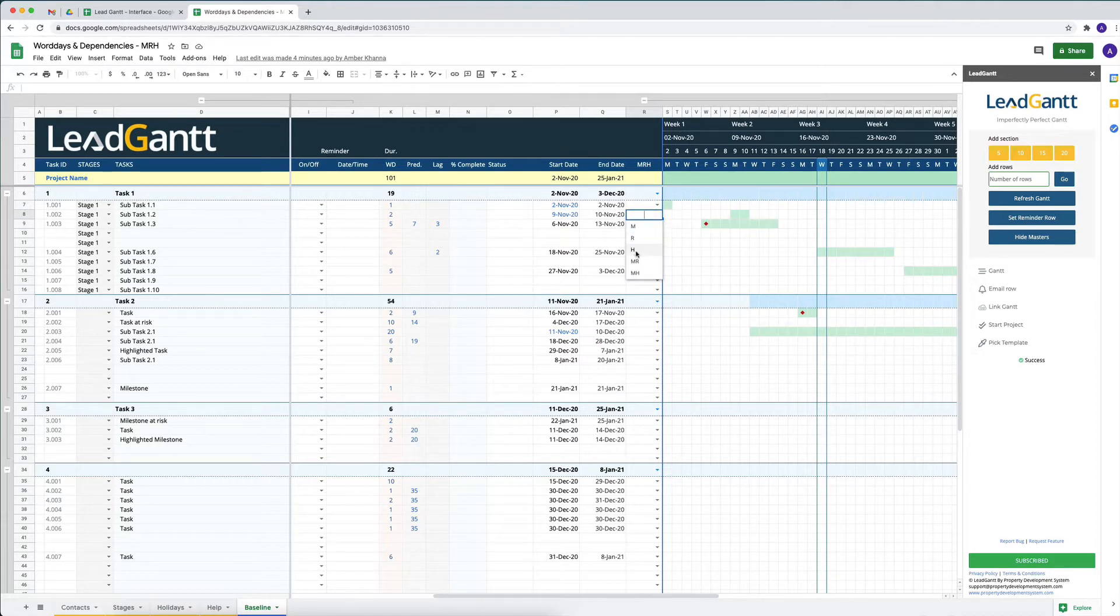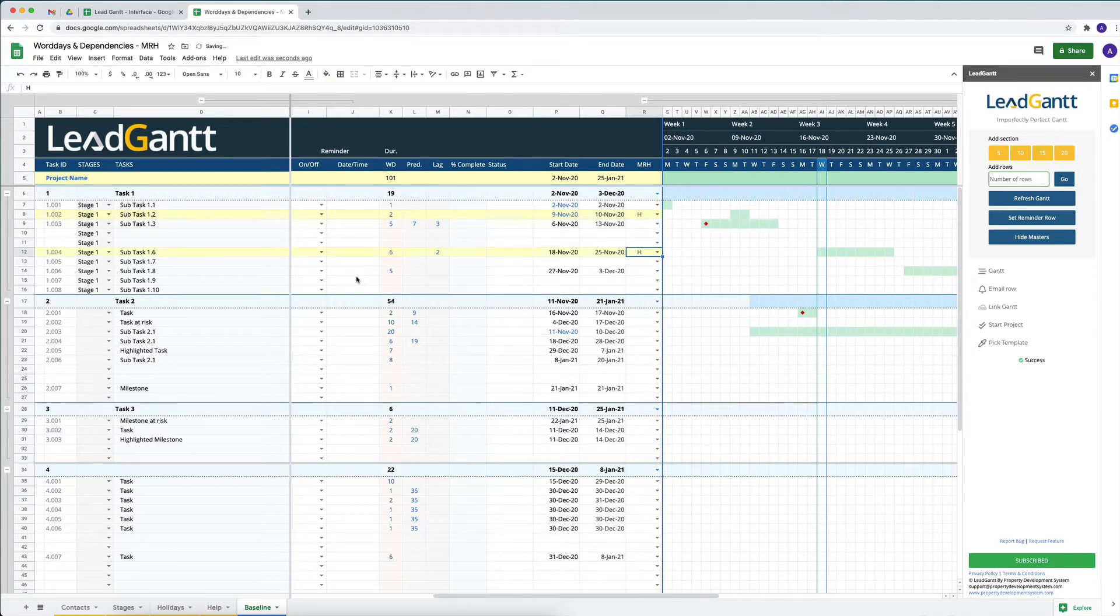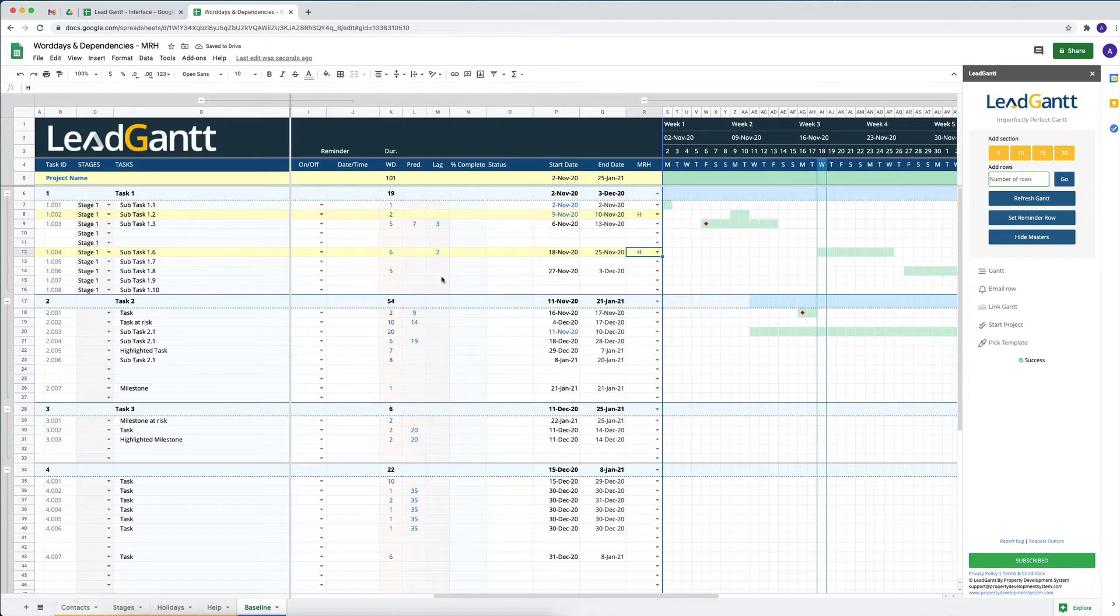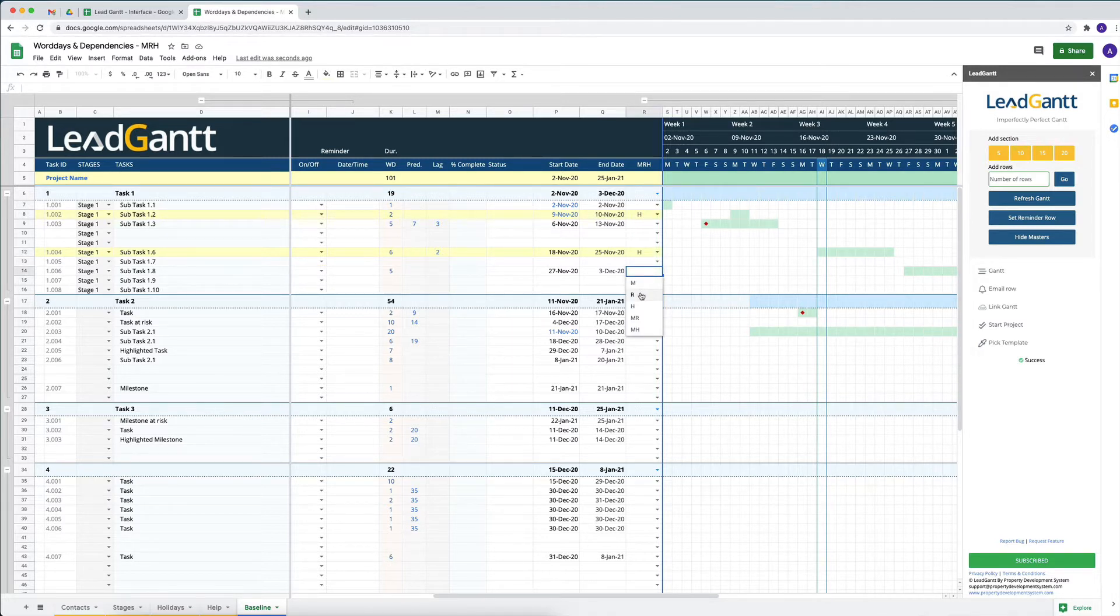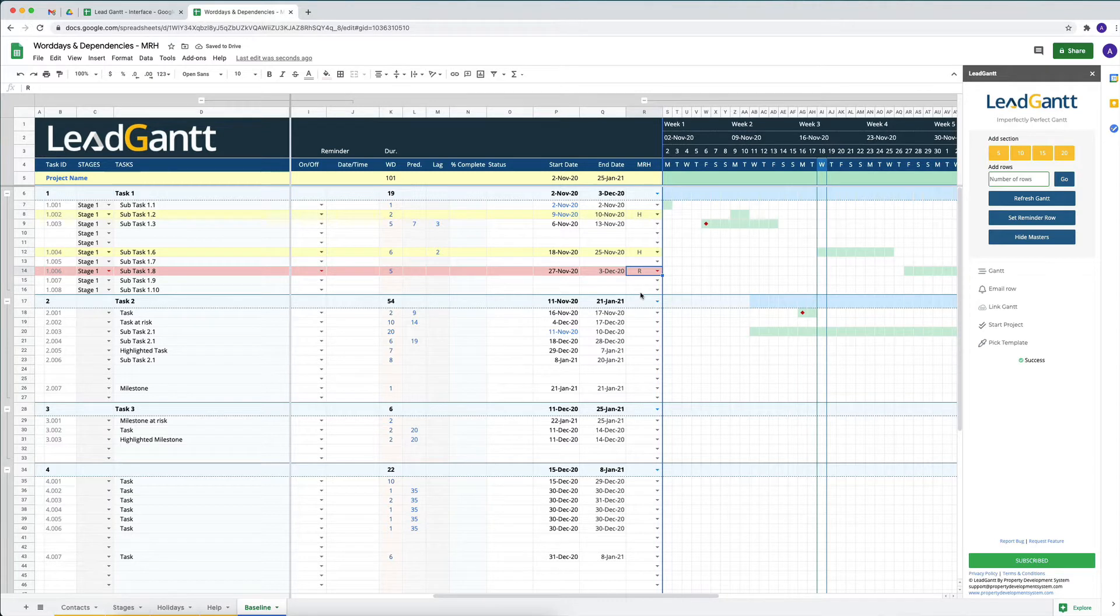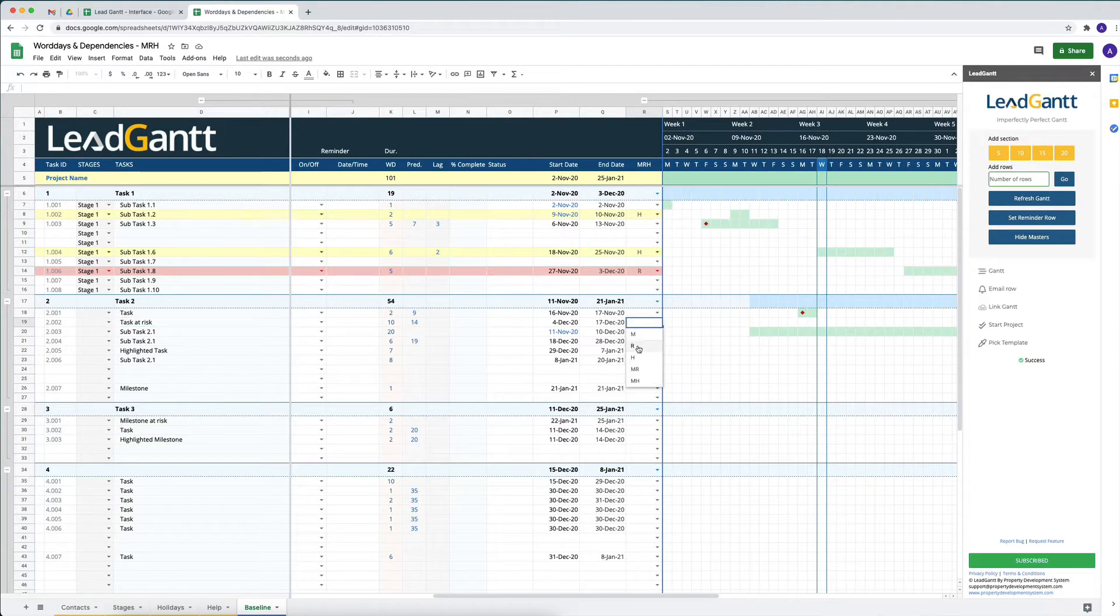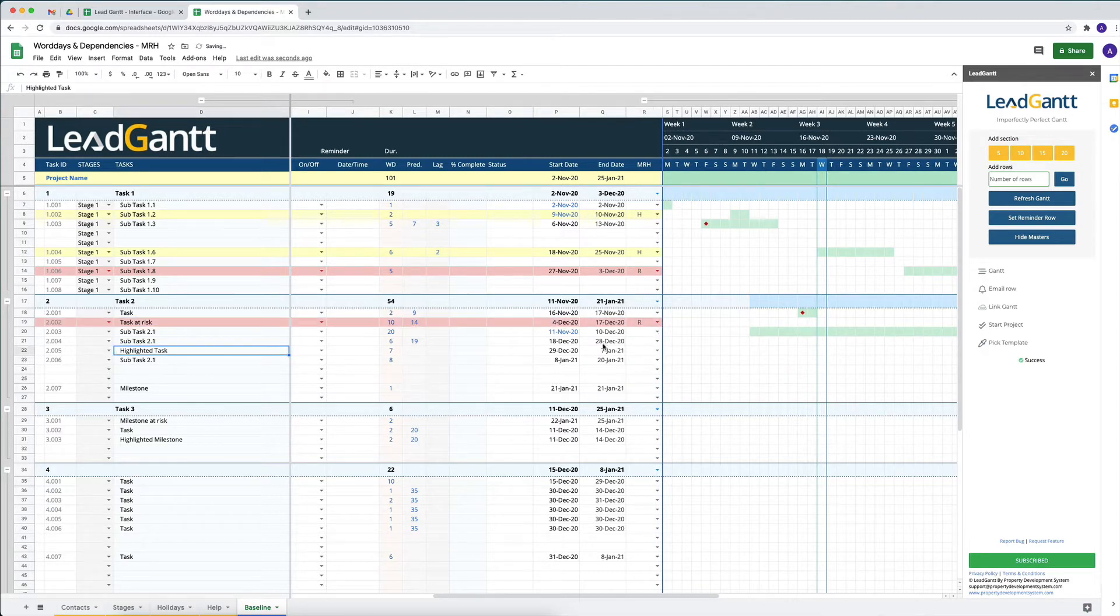We can click on this drop down and select H and that will highlight that task for us. We can do that to any task that we want. We can also mark a task at risk or if it's for whatever reason getting delayed, we can mark that and let other people know that this is at risk.